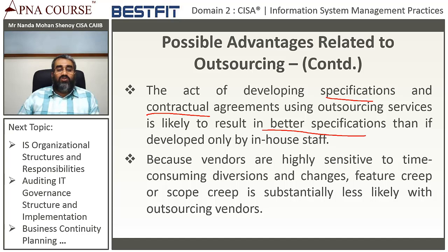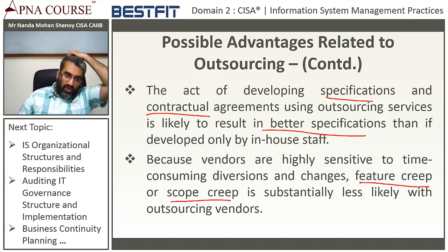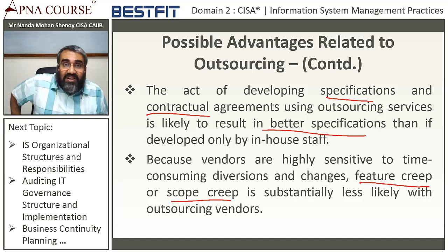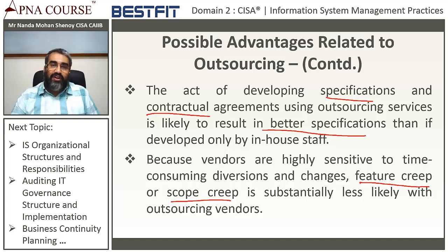Feature creep or scope creep is substantially less likely with outsourcing vendors. Also a very good feature. If you are developing some software in-house and you are developing software from an external vendor, we have practically seen in 2-3 instances of audits, an externally developed software has very little change requests, whereas in-house software has innumerable change requests, for the simple reason that in-house means it is our own and outsource means you have to pay, which is a myth again if you ask me.